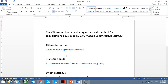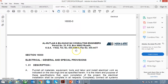In 1995, CSI MasterFormat developed a specification called MF95. This specification consists of 16 sections, and each section consists of five digits. In year 2004, this MasterFormat went under a major revision and is called MF04. MF04 consists of 50 sections, and each section consists of six digits — to differentiate it from the obsolete MF95.